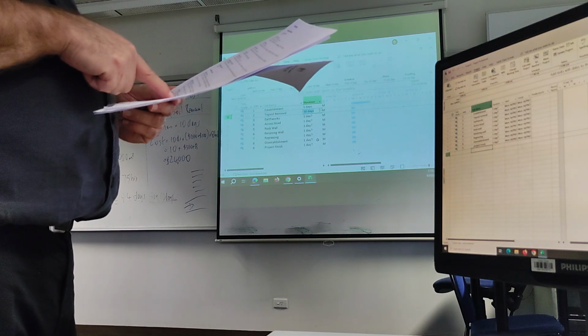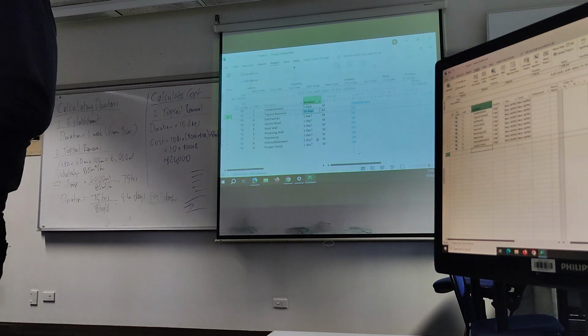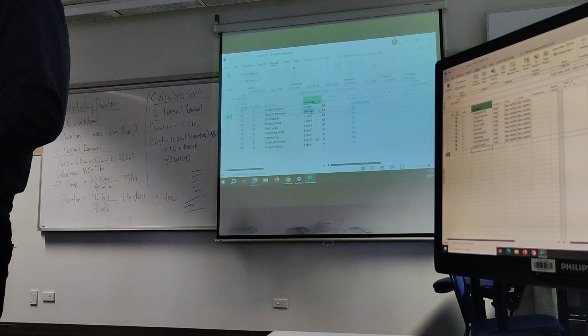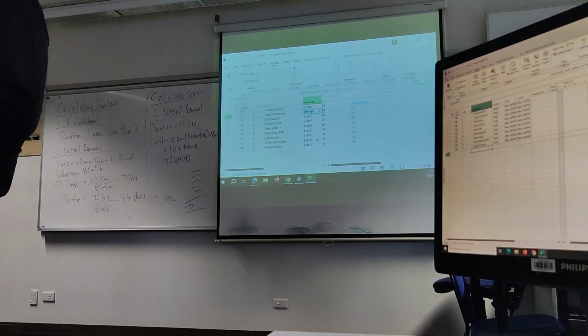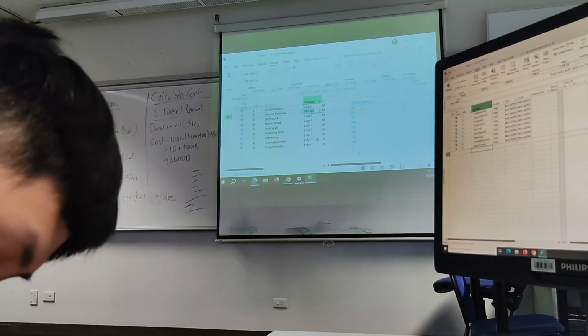So how much for the excavator? What did you guys get? I got like 36,000. 36,400. I got 37,700. Guess it's a great mystery. With the lunch breaks. Oh yeah, wait a minute. The labourers would be 10 hours a day. So the labourers would be 10 hours a day because you're paying them, but the excavator and the truck are only working 8 hours a day.